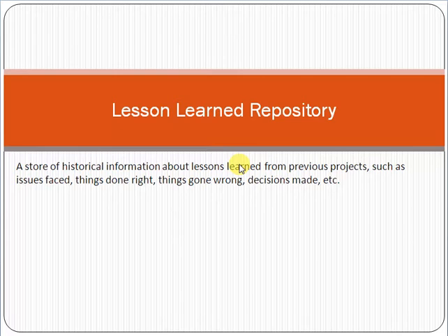Historical data means that we know that in the past a similar e-commerce solution implementation was done in 3 months, so we say that this particular project we can also complete in 3 months. We didn't take the opinion from the experts, and once the project execution starts, we get to know that there are many complexities in the project and we can't complete it in 3 months.